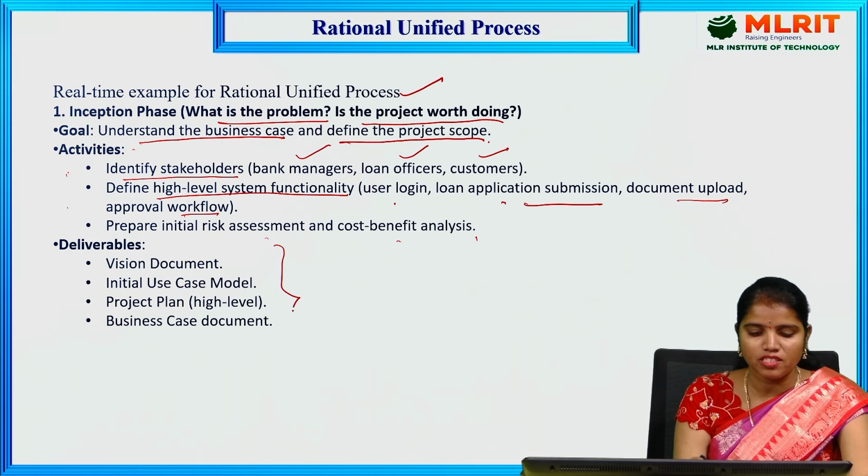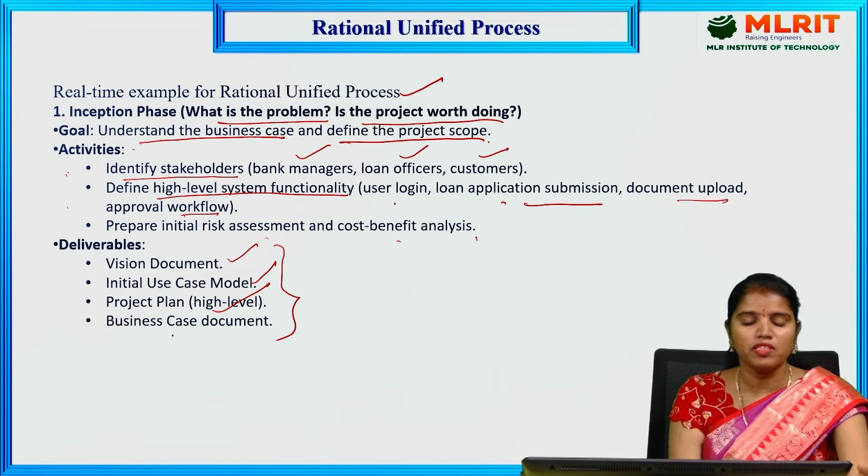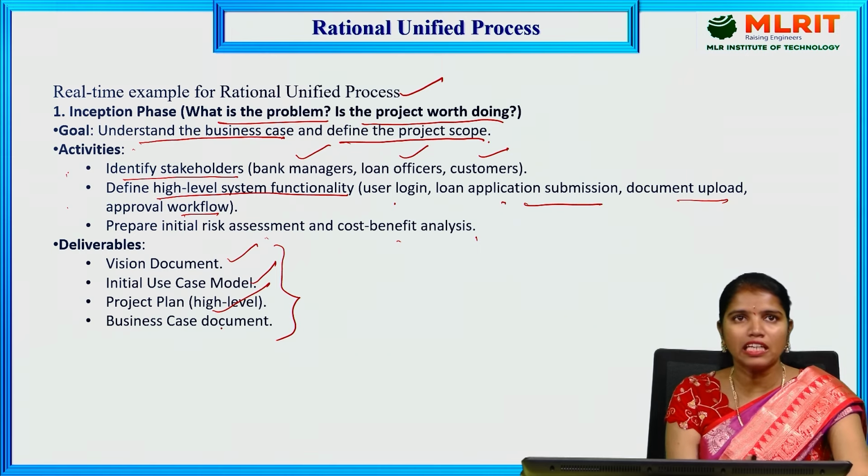Deliverables. These are the vision document, initial use case model, high-level project plan, and business case document, which will be clear in this inception phase.